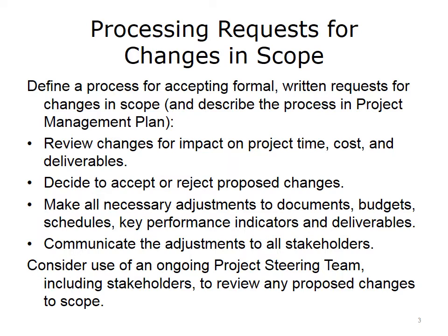Consider this classic example of how a simple one-sentence change can have tremendous implications. Suppose a change request stated, any user could negate any change he or she had made during any interactive session. This simple one-sentence change might sound harmless, but there are tremendous implications for any system to accept the ability for users to undo any previous actions. This is often extremely difficult to implement. So-called simple changes may have enormous impacts on your system or your project, and the effort required to implement these changes must be considered seriously using your clearly defined process.